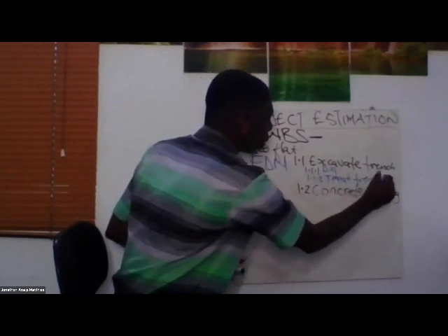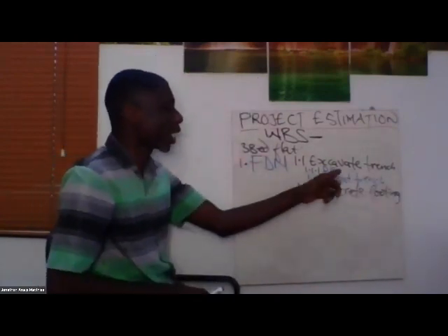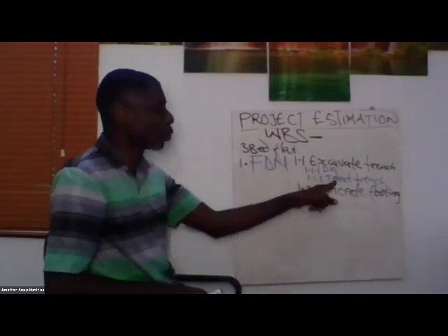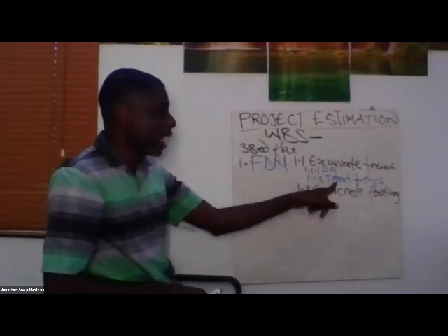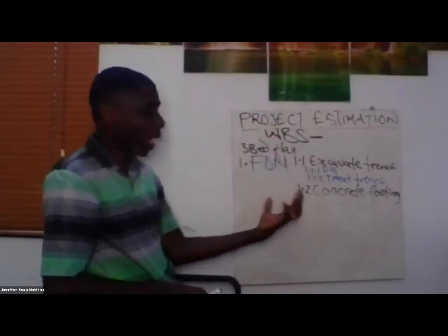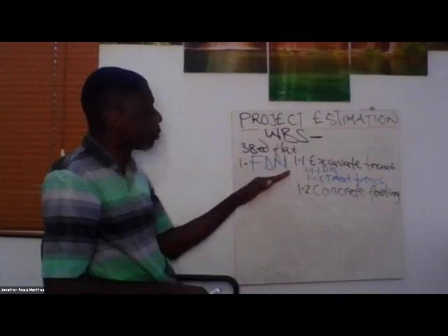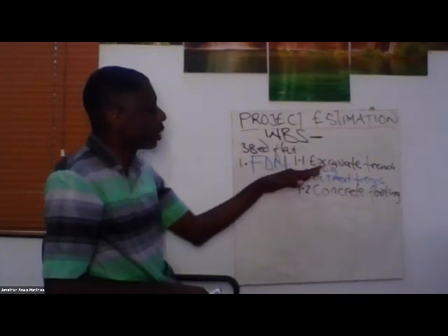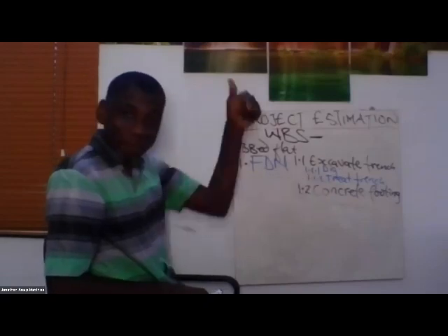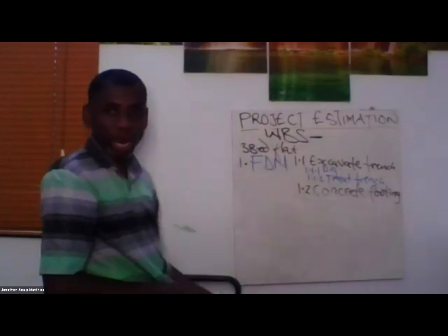Treat trench. So you can see, you can estimate the duration and cost for actual digging separately, and estimate the duration and cost for treating of trench separately. It will now give you the overall duration for excavating trench. So you can see that because it's in how many levels now? Level 1, foundation. Level 2, here now is excavate trench. Then the WBS third level, you have decomposed it even further into actual digging and then treatment of trench, right?